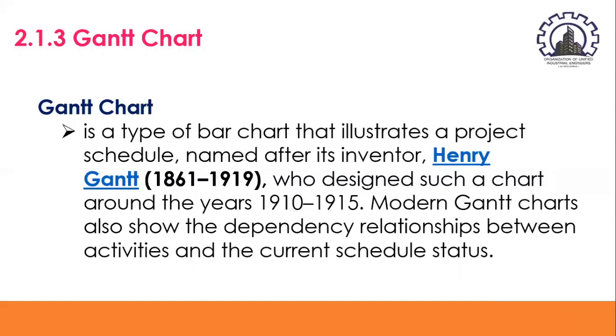And take note that the Gantt chart was probably the first project planning and control technique to emerge during the 1940s in response to the need to manage complex defense projects and systems better. In other words, a Gantt chart simply shows the anticipated completion times for various project activities as bars plotted against time on the horizontal axis, and actual completion times are shown by shading the bars appropriately.